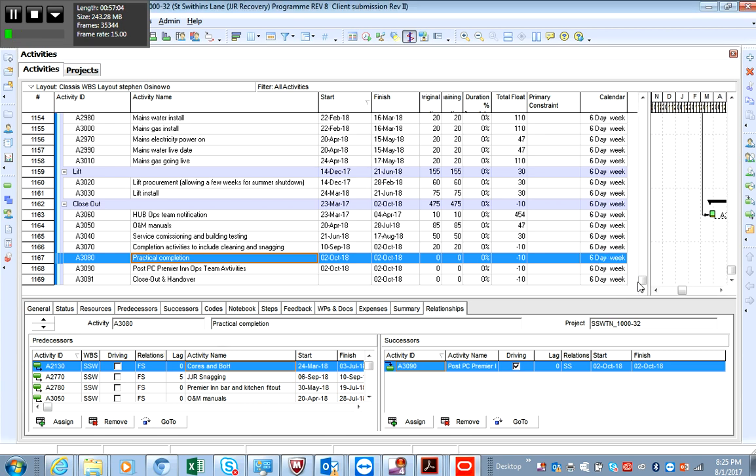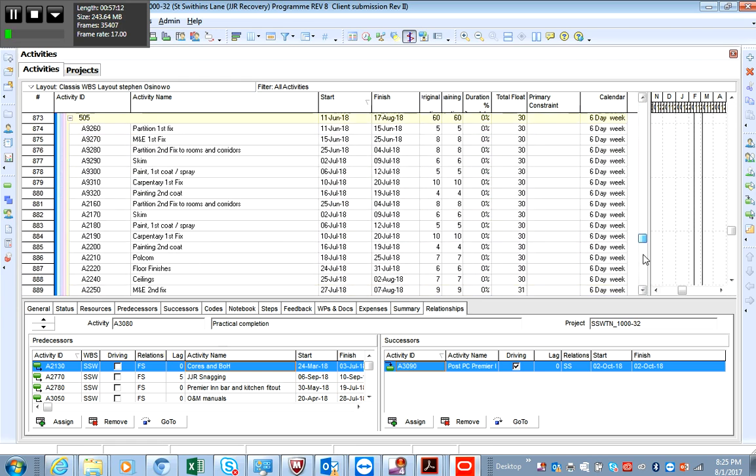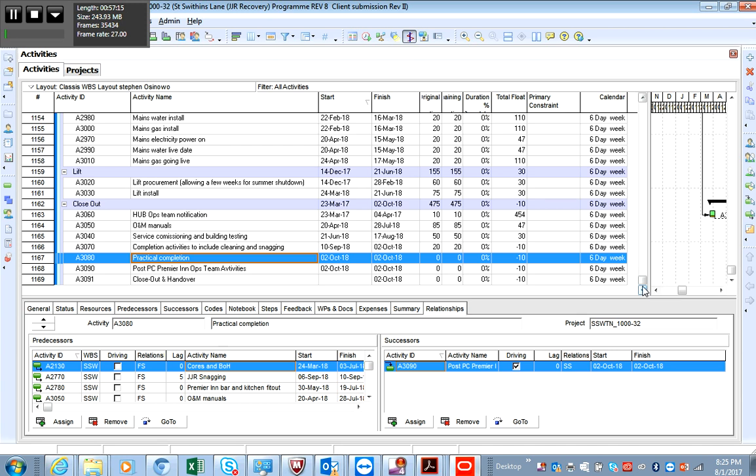So in order for you to accelerate this program, it's highly unlikely that you're going to be able to get a 7-day week. Why? Because of the statutory notifications, the road closures, the road permits, working weekend permits, i.e. the Sunday permits. A lot of councils will not allow it. Also, you have to get road closure permits in terms of your delivery schedules to sites.